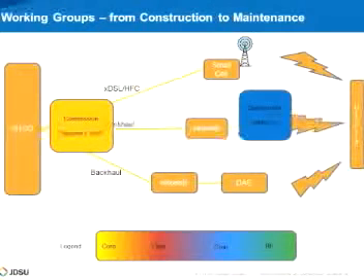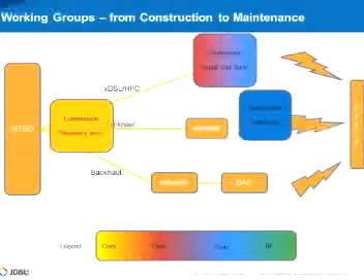In a typical construction of a cell site, you have a construction contractor, a tower crew that does the climbing, does the RF cables, and that's simple coaxial work, making sure everything is terminated correctly. But as things evolve, you're now starting to see in small cells the introduction of fiber. So the small cell tech now has responsibility not only for the coax, but also for the fiber that they're